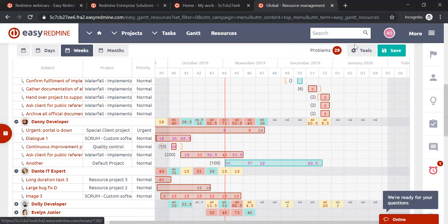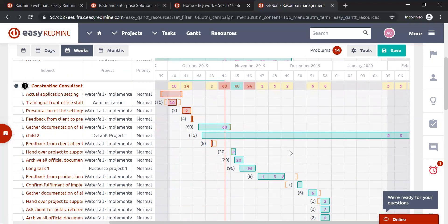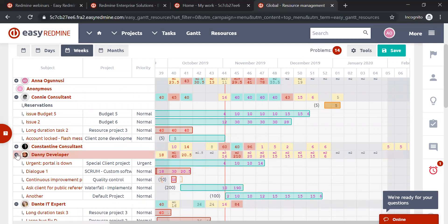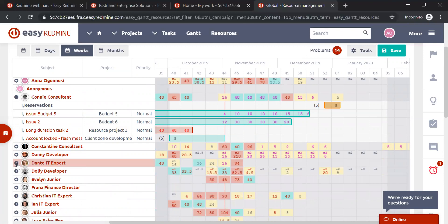Once you use the balancer, it's a one-off action. If after that the person takes a vacation or something else changes that affects their available hours, you need to use the balancer again. There's also an important caveat: if you use it at project level, it only considers tasks for that user within that specific project, not from other projects. Therefore it's recommended to use the balance tool at the global level so it takes into account all tasks across all projects the person is a member of.